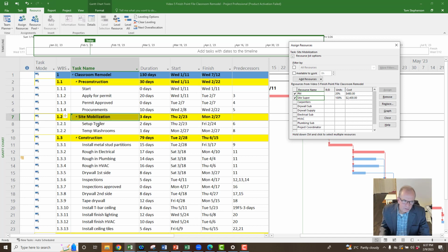Now, there could be some pushback that you could say, well, it's best to assign them to activities. If they're going to be in a lot of activities, they're going to crisscross over each other. You have to be careful that you don't assign where they cross over, because it double counts. If you're counting money, it'll double count them. You would have to set up separate line items that would span, like a hammock activity that would span the project team instead of having it on a heading. But I'm going to keep it simple for now.